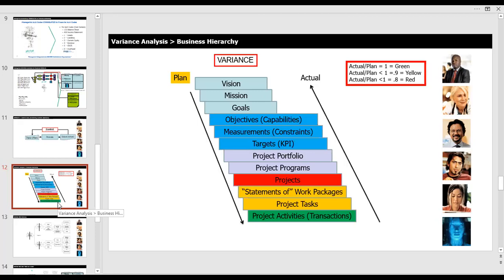Well, while that is a use of the plan, the purpose of the plan is that it acts as a measurement or a baseline to measure actual. So you think it's going to take an hour, but it actually takes you 2. There's a variance. Or if you think it's going to take you an hour and instead it takes you 30 minutes, there's a variance. And the variance allows you to improve your planning process.